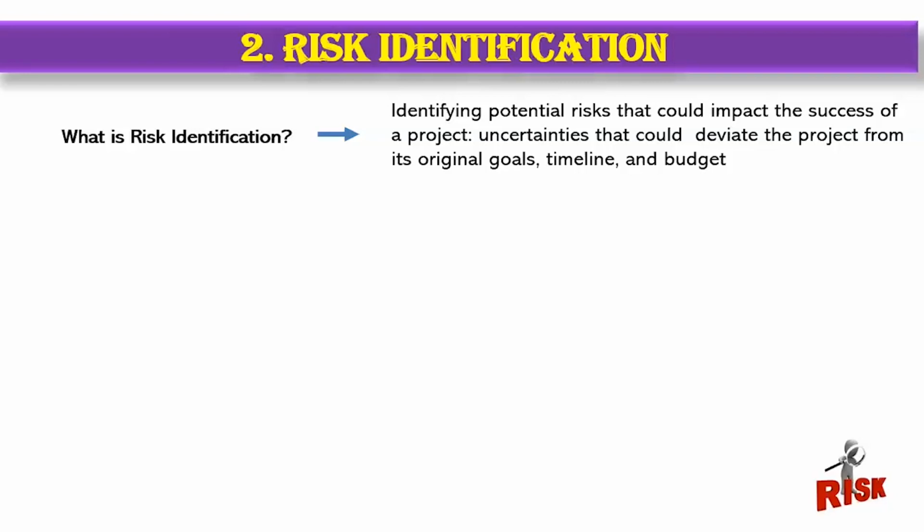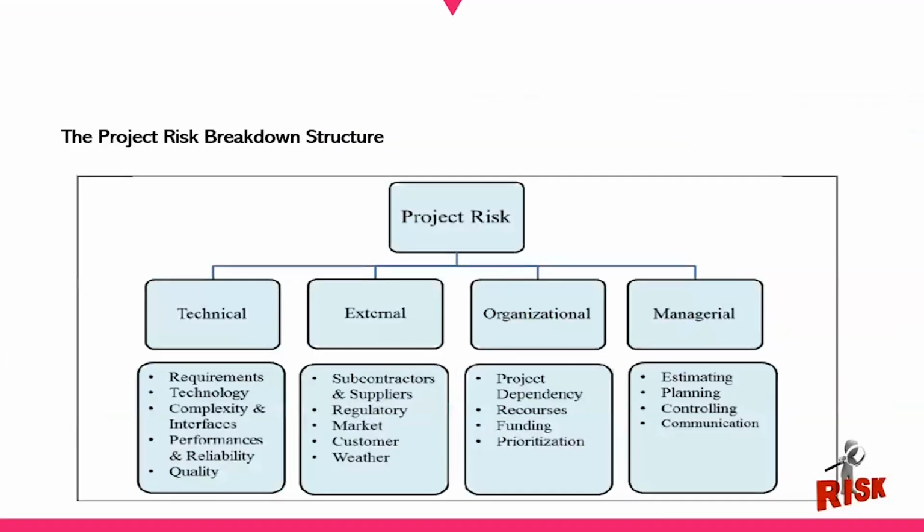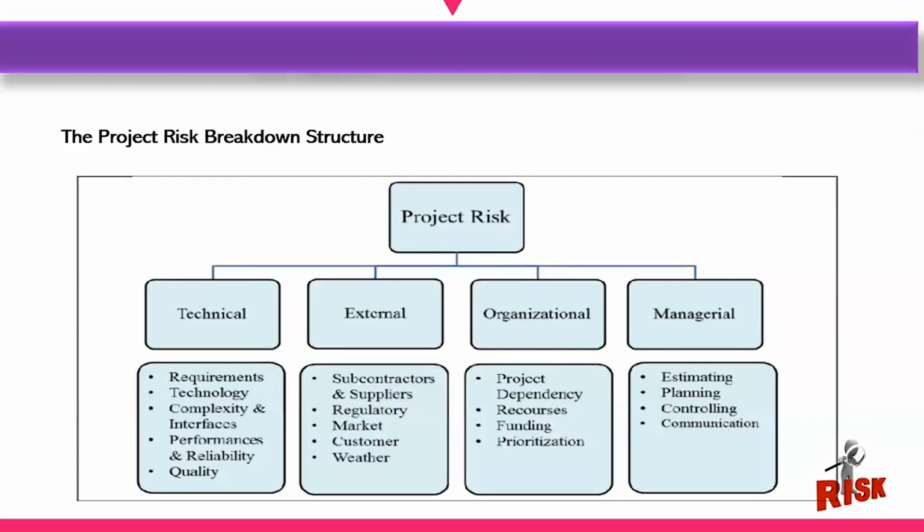When we finish the whole risk identification project, it should develop into what we call the risk breakdown structure, RBS. So the standard stylized terminology for risk identification is the eventual development of the risk breakdown structure. It is the decomposition of all the risks on a project into their very individual components to enable extensive identification of the risks and the subsequent management.